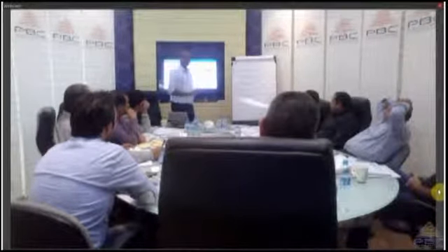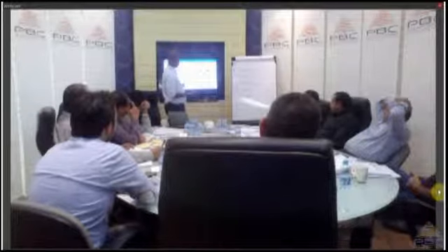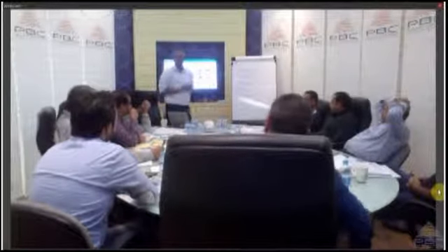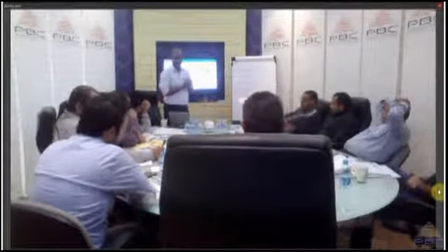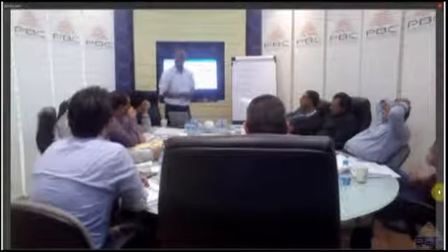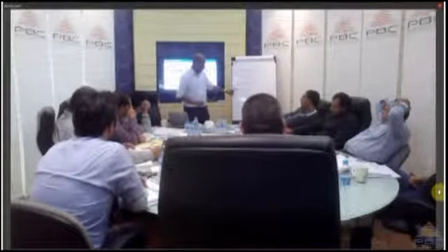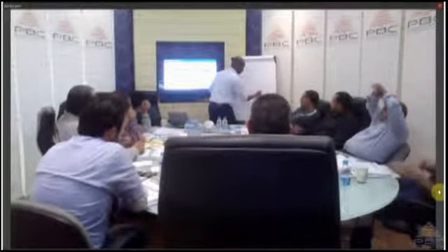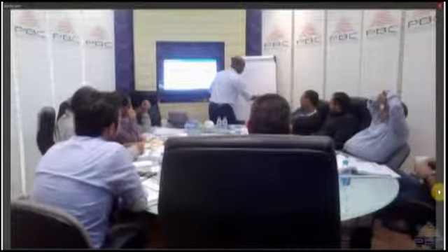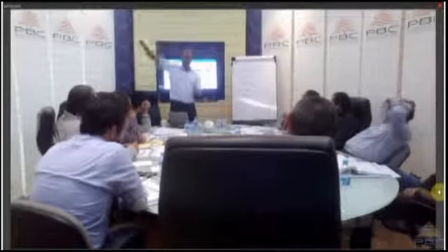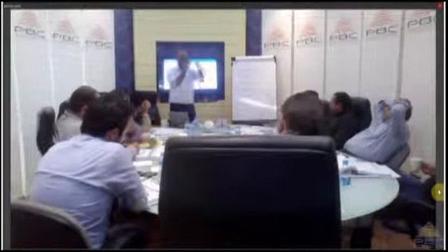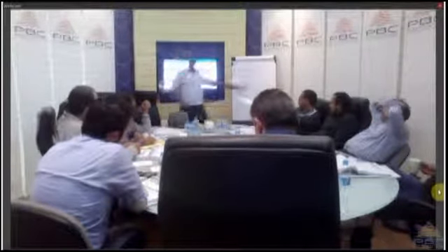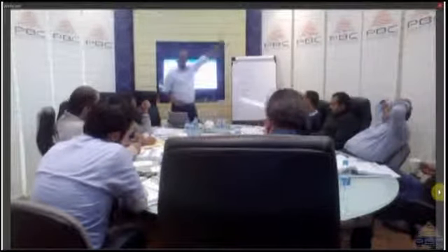Exactly. So what he just did is called what? Vendor bid analysis. He just summarized what's happening in the vendor bid analysis. We do it, of course, in a more scientific manner, but we just summarize it. Now, D and E, what do we call them in statistics? Outliers. You know what an outlier is in statistics? When you're counting something and then suddenly there's a measurement that's way away from the normal, we call it an outlier. It's something illogical.